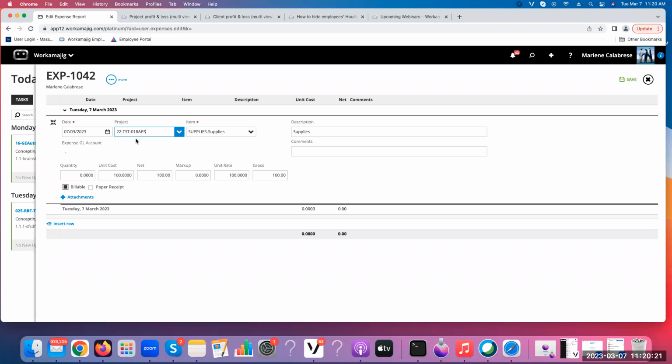A lot of people will put even things like bidding new business there. So time entries, not just expense reports, could apply there. If you send the client a big giant bouquet of flowers as a thank you gift, you're not going to want to cost that to a particular project, but you might want to cost that to the profitability of the client overall. So that's where you could have an overhead project. And if you have any questions about whether that's right for you or whether that's meaningful, of course you can meet and talk with your account manager about that.